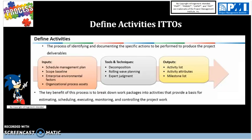The work package is broken down to individual activities via decomposition, and the work package is the lowest level of the WBS. For outputs, we have the Activity List — a list of activities or actions taken to meet the goal of creating deliverables for the project.